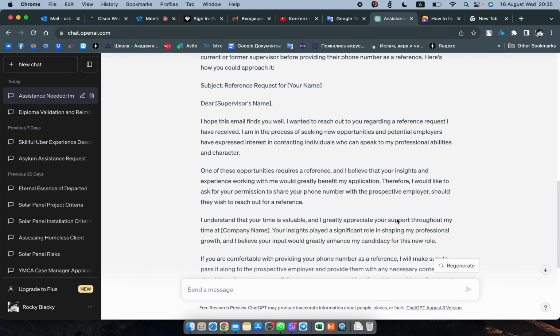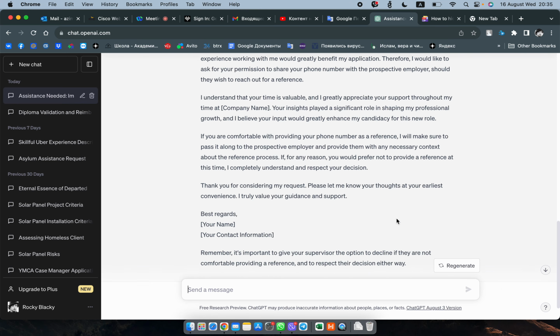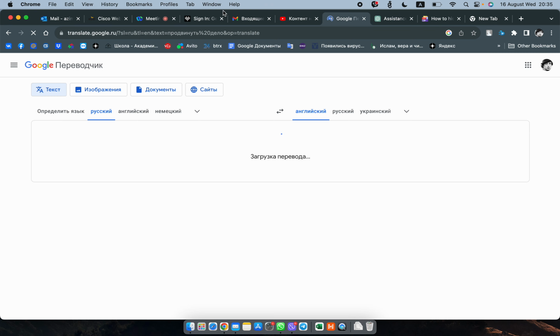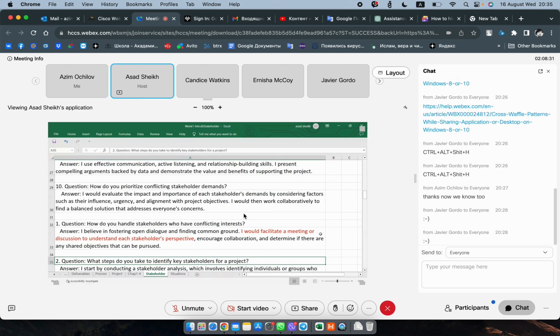But obviously in the PMP exam, you will get 1 or 2 great answers and 2 totally bad answers. You just have to eliminate the bad answers, dwell on those 2 good answers and pick the best answer. And knowing the approach that they're showing you here, you got to listen, you got to understand, you got to explain. What else you got to do? You got to do the impact analysis, and you got to keep them involved. And then after the impact analysis, you can make the change, yes or no. And sometimes you can reject.